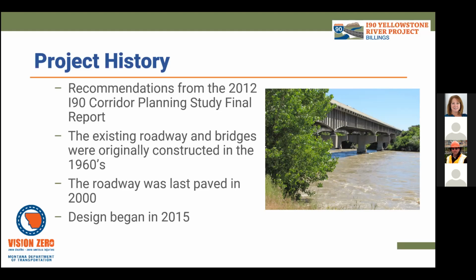So since the planning study was complete, again back in 2012, MDT nominated this project for development, and that's when we came on board and we started the design process back in 2015. And so as it stands now, we are putting the finishing touches on the design, and we're going to be submitting final plans and specifications at the end of March. And from that point, the project will be packaged up. It'll be advertised to contractors for bidding. And then ultimately our goal is to have this project begin construction in the fall of this year, so fall of 2021. And I'll talk a little bit more about the schedule later on in this presentation.